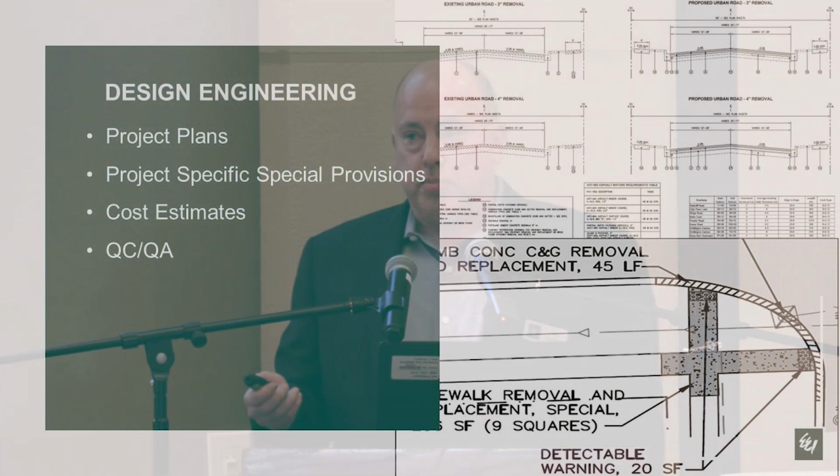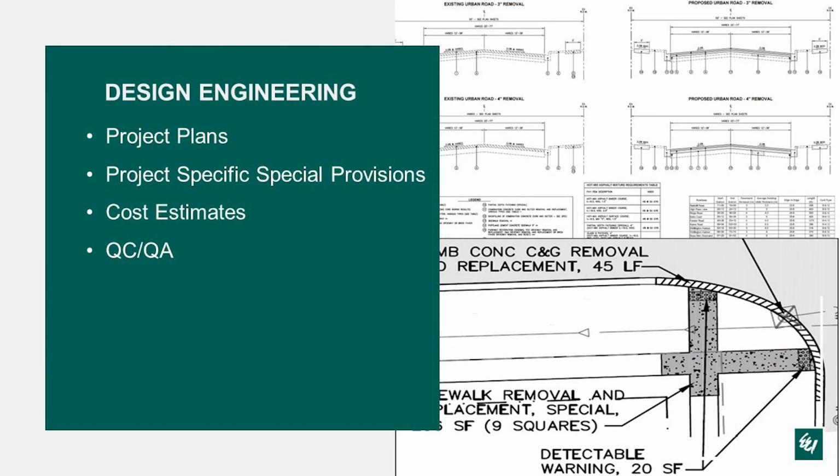So project plans. Not all projects are required to have plans. Maintenance section, MFT projects are not required to have plans. But if they're required, we would provide plans. Typically, there's always specifications. If there's not plans required, there's always specifications. And then the cost estimates.